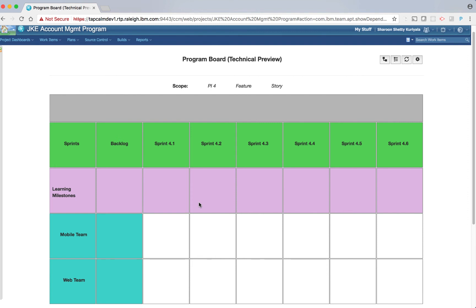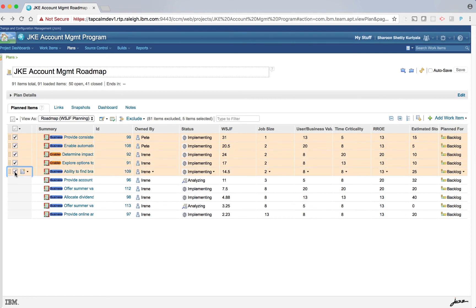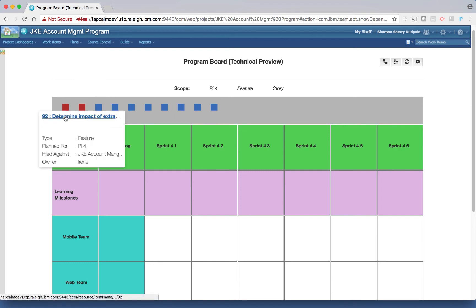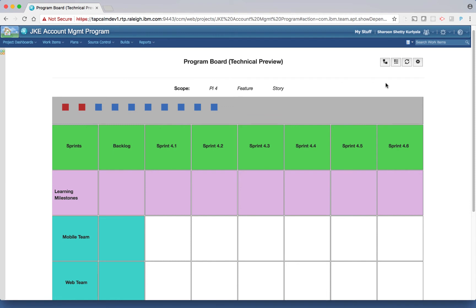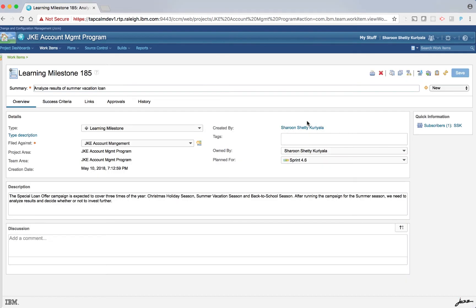The first step is to identify features and milestones for the program. The program manager works with the team product owners to review the WSJF-ranked features proposed for the next PI, PI4. They review the EPIC hypothesis statements and the acceptance criteria, then pick the features that need to be planned for PI4. After this exercise, the board shows in the first row all the features planned for PI4. Features have colored distinguishers — blue stands for business feature and maroon stands for enabler feature. The enabler feature will require some design work and validation by stakeholders, so corresponding learning milestone work items are created.